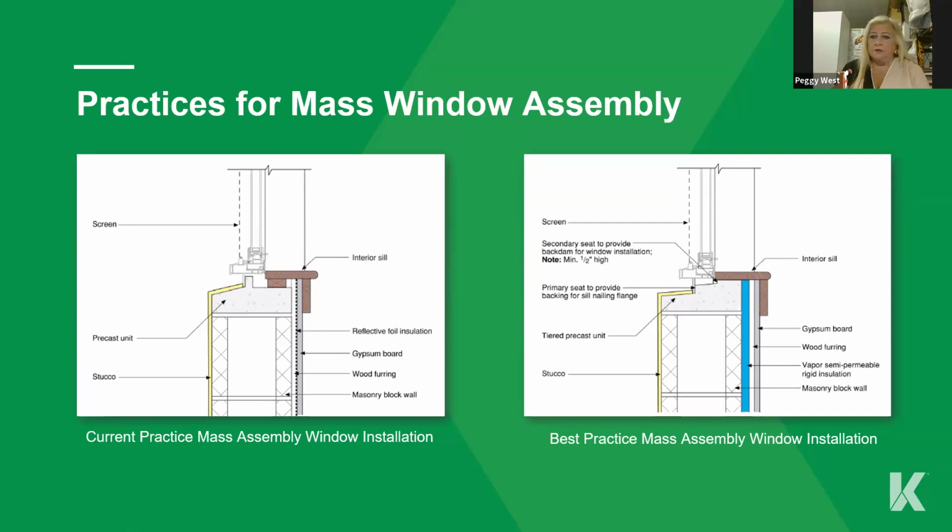It says, do you do engineering reports for truss repairs? We do. We typically, though, first ask who the truss supplier is. Usually the truss supplier who originally supplied the trusses, if it's a newer building, we want them to weigh in. It's their trusses. It was their original design.